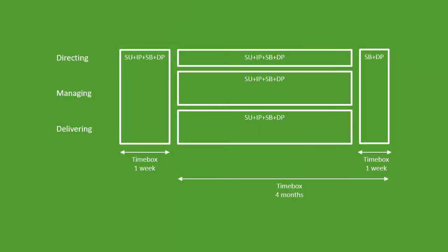And then we get to the delivery stages. Now in the delivery stage, you would have directing a project, you would have controlling a stage, and you would have managing product delivery. Now starting from the bottom, in managing product delivery, that's where we have the sprints, the team level iterations. So they are sprinting along 2 weeks, sprinting, and each time they finish a 2-week sprint, they have something done, and they're showing that to the users.